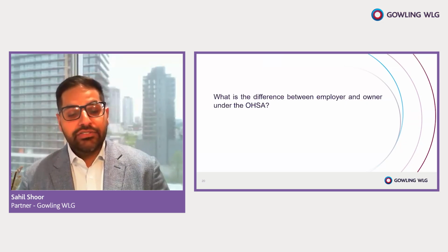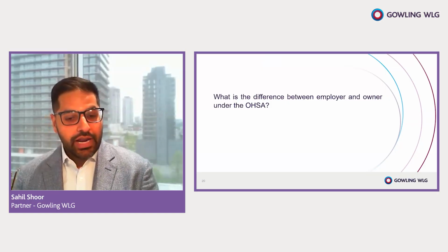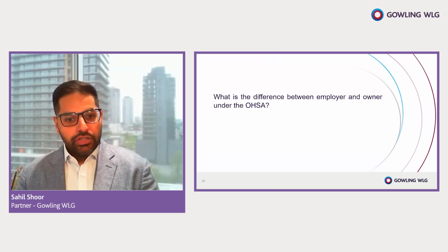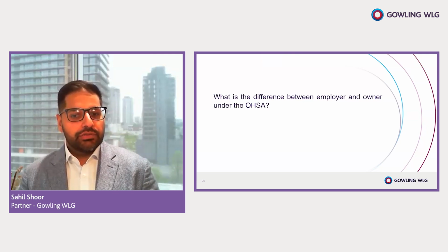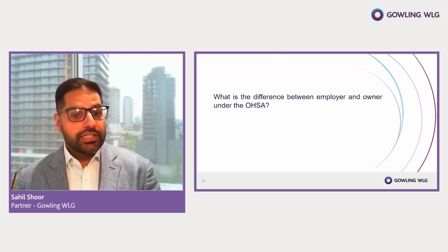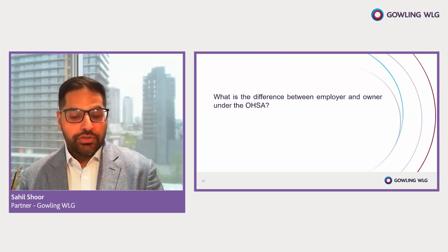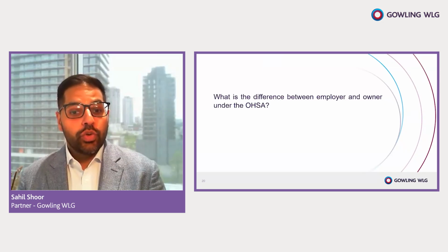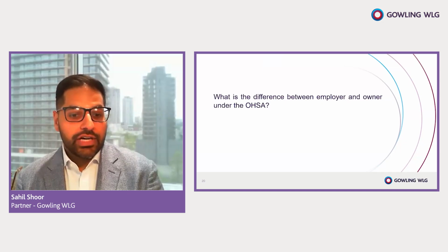The responsibility applies irrespective of the size, scope, or nature of the contract, all the way from a simple project to a very large project. Speaking about larger, phased or much more complicated projects, you might have multiple contractors on the site. So it's important to contractually make sure that everybody is clear who is the constructor, and that they have the authority to be the constructor and control the site. Failing that, if there's an accident, the Ministry of Labour could come back and say there isn't any one party who has control of the site, and therefore you, the owner, even though you thought you delegated everything, are the constructor, and so you are on the hook for these charges. That's what I would say, Tushar, from the contract perspective.